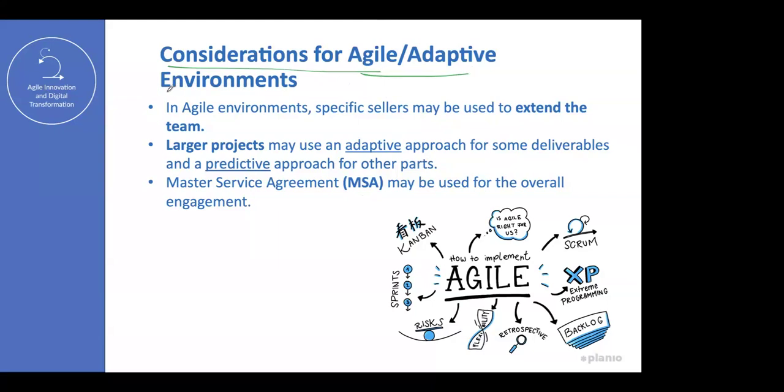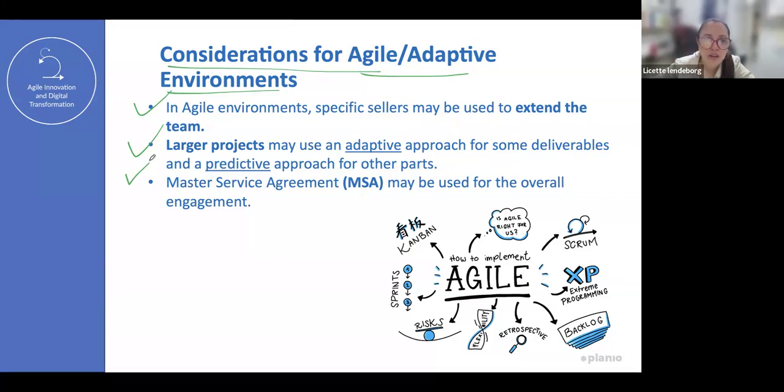Considerations for agile adaptive environments. In agile environments, specific sellers may be used to extend the team. Larger projects may use an adaptive approach for some deliverables and a predictive approach for other parts. Master service agreement, MSA, may be used for the overall engagement.